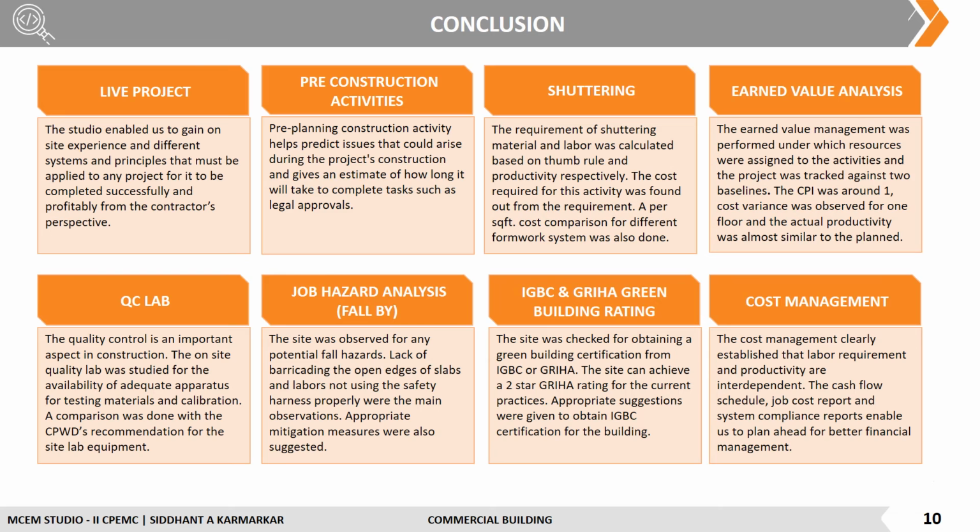The shuttering material and labor requirements were determined using the thumb rule and productivity, respectively. The required cost for this operation was determined by the requirement. A cost per square foot analysis of various formwork systems was also performed.